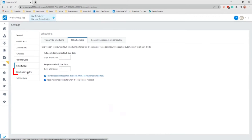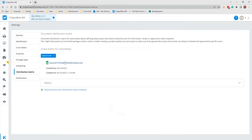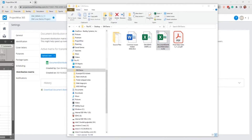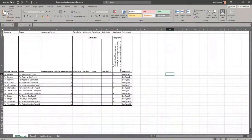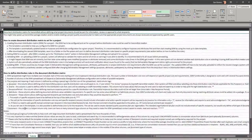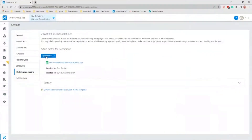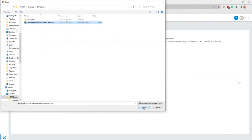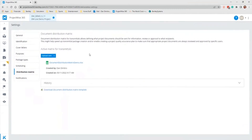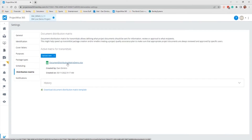The next area I'd like to cover is the distribution matrix. There is a document you can download from here to set up your distribution — this file right here. Mine has already been modified and set up, where you can add users for whichever role — for example, role one is the DM admin. I have my three admin users set up with the rights they have and the roles they need. This spreadsheet includes built-in directions and a key for the different validation criteria. Once you have it set up the way you'd like, you come in and upload it. If everything is set up correctly, it checks the spreadsheet and brings it in. If there's an error, it will notify you so you can go back and fix it, relying on the help tab and validation data tab. This is handy if you have a lot of users and want to push out changes all at once rather than setting them up one at a time.